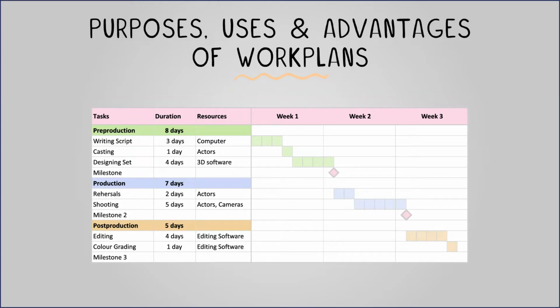Work plans also identify milestones, required resources, and contingency time. The blocks on the Gantt chart are shaded as each task is completed, allowing progress tracking. If a task is completed later than planned, additional resources can be assigned or contingency time can be used.